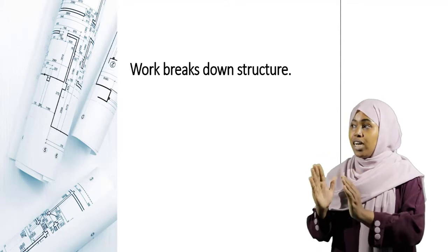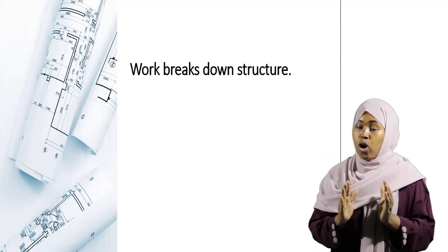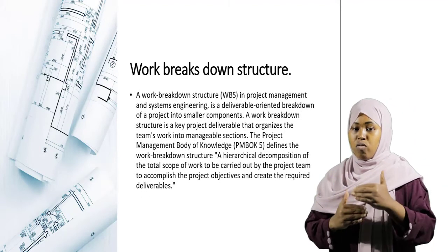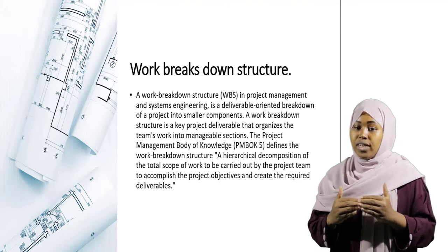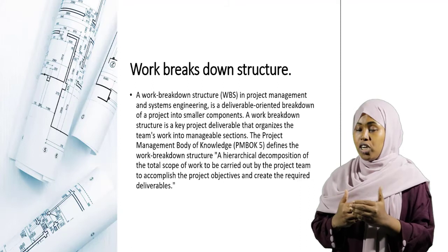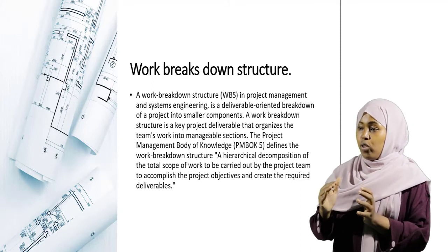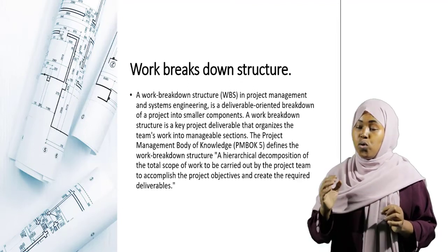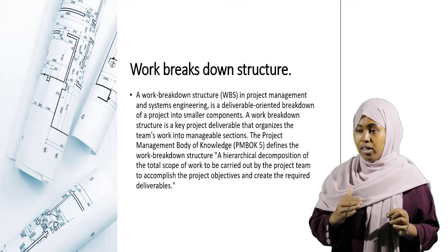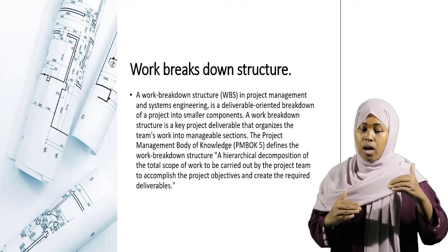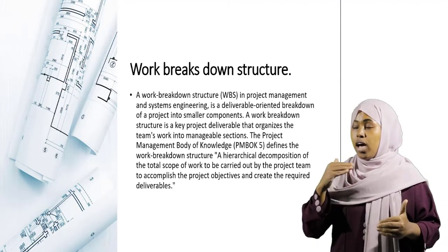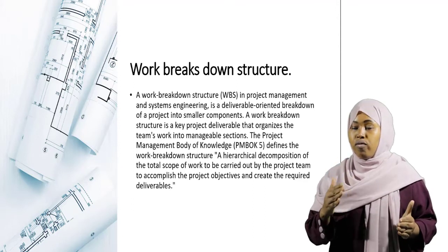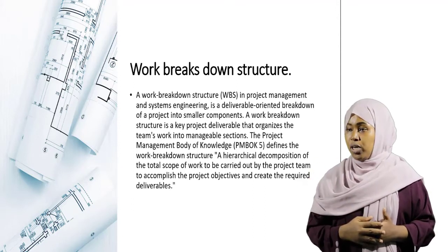After that, you need each activity in a work breakdown structure. The work breakdown structure will help you to manage all activities as smaller ones, one by one, and will help you to proceed. For example, the first activity was community mobilization. When you're implementing that activity, you need to make smaller activities like engaging the community and booking a venue. So this will help you with the work breakdown structure, and one by one your activities get allocated budget.